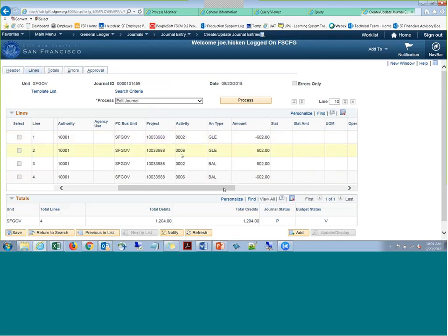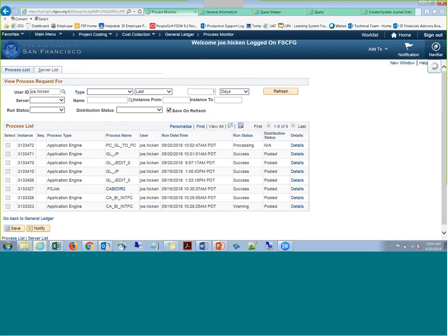But if I did it correctly, then I abated the cost here, and what I hope to see when this collects correctly is that there will be a BIL row for $100 for this activity on this project when I rerun the query, and there will be an OLT amount of $502. So we shall see. The cost collect does take a little while. That's why we run it as a batch, and this isn't something that the user is supposed to run. Thoughts, questions, concerns?